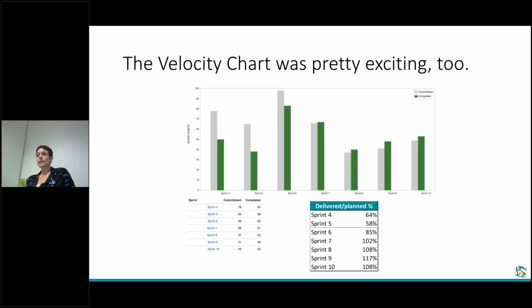So stuff that was added, there are a couple things that are not included in here because they're not best practices. One of them is adding stuff to the sprint that was already closed prior. So should you be working on something that you forgot to stick in the sprint and then you're like, oh my God, I finished that thing, but I want to put it in the sprint. Be sure you put it in the sprint and then close it. Otherwise, it flags it as a thing that was done outside the sprint and it won't count it towards your velocity. Also, if there's stuff being done outside the sprint, I would ask you why. And I would ask you why it's not part of your sprint because it is work being done by that team.